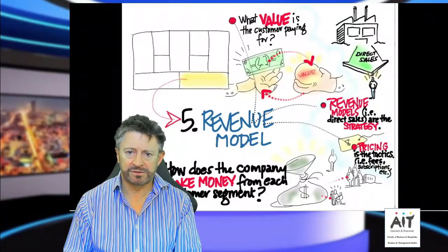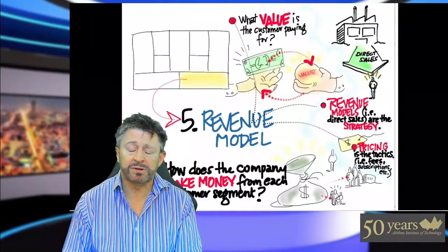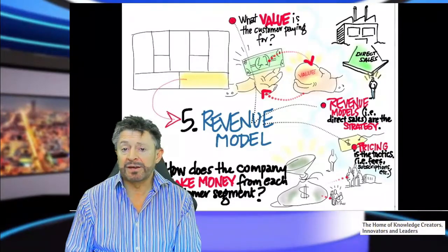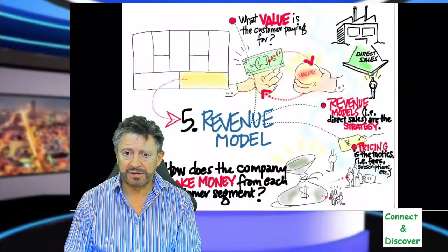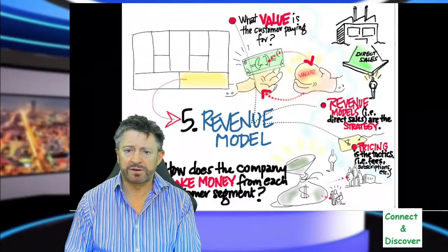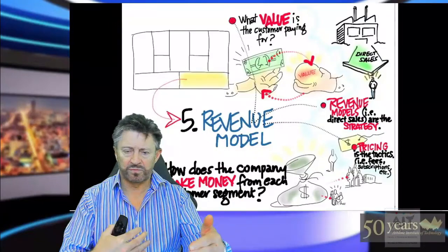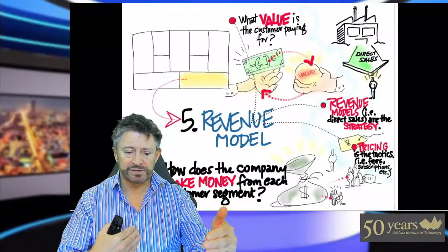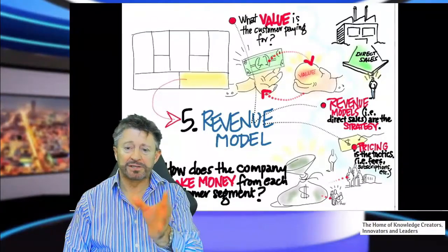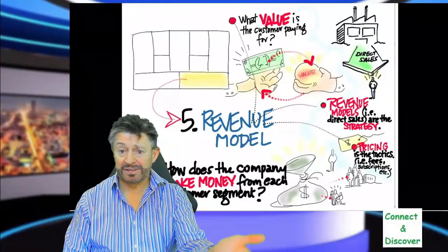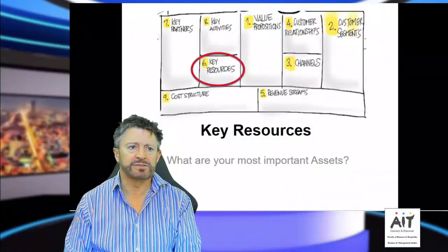as I say, sell it directly in the shops, or you might lease it out over a period of time and so on. It depends on the product and service itself. If you're hiring an architect, for example, you might pay a retainer fee at the start, and then you might pay him at each stage of his plans when they're ready, and then you build up a contract. It's a project, you pay him at different stages. If you're buying a USB stick, you pay there and then. It's that simple, so you have different models depending on whether it's a product or a service that you're offering.